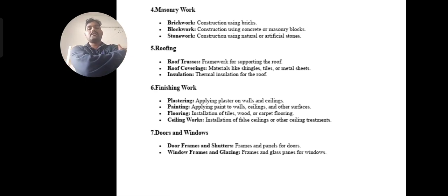Likewise, if it is a normal one, it is around 6,000 to 8,000 for one main door. It is based on the design and their choice, they may opt for these types of doors and materials. So the number of main doors multiplied by the cost of one door gives you the total cost of the doors, and windows likewise.